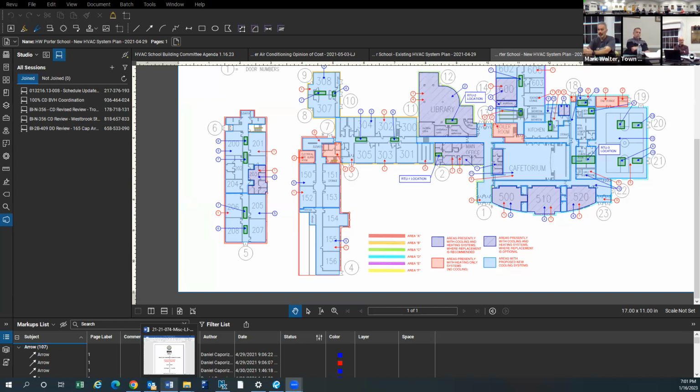And I know that if we do get approved for the grant, and we hire a designer, get the bid specs, go out to bid, and all the bids come back higher, you don't have to do the project. The state would be willing to take that money back, because the town hasn't expended any money. Then you go back to the drawing board and say, okay, where can we change? Do we only do one floor in a wing? Do we come up with a different electrical change? You rethink everything. And we're hoping too, with the designer and an actual bid, maybe we'll come in tighter, a little closer, and cheaper by then.